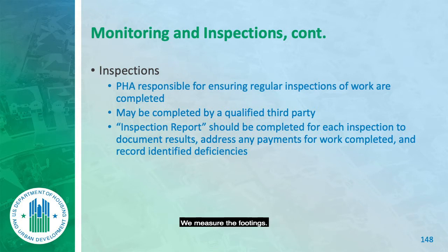We measure the footings, see if the footings are proper. And what am I looking for the next morning in the concrete pour? I'm looking to see if they're shaking the steel, the rebar, shaking it to bring it up so that it's in the middle of the pad and they don't just leave it laying on the bottom, which a lot of lazy contractors do.